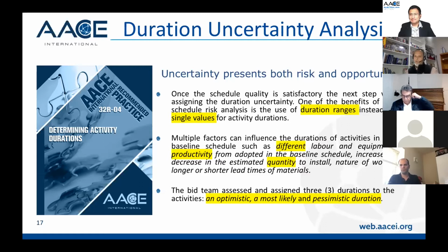And also sometimes you need to bid a project when the design is not complete, and you're doing your bill of quantities or material takeoff based on the available design. You know that there's going to be design development and design growth. And then you can assess what is the potential increase or decrease in the quantities that you have in the baseline, and what is the potential impact on the end date.